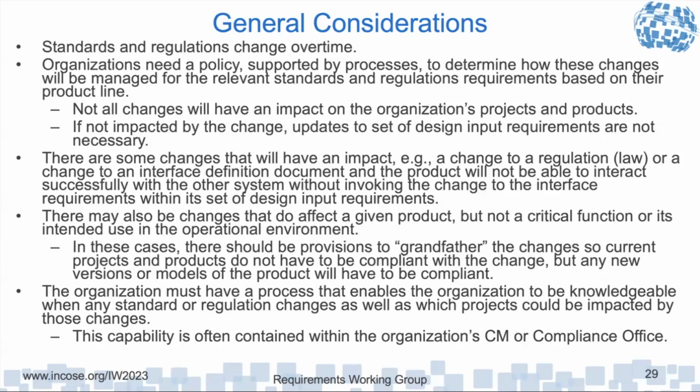So this could pose a problem when you go to seek approval and then find out that there was an expectation by the approving authority that you were compliant with the latest version of the standard regulation and you're compliant with an older version. So organizations need to deal with change.